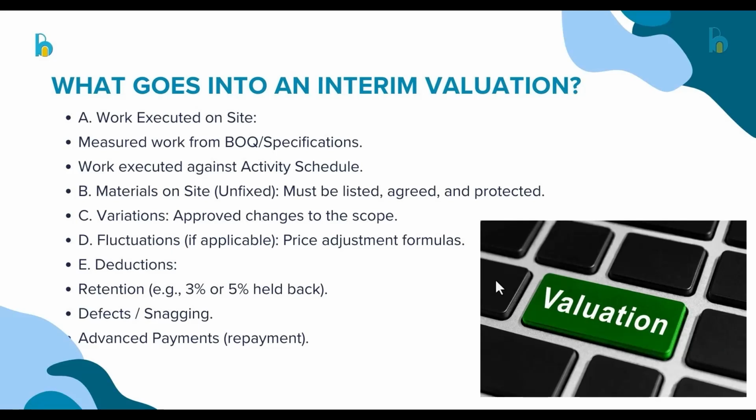Then secondly, measured work from BOQ/specification. That also goes into valuation. Work executed against activity schedule. So when you have work that has been executed against activity schedule, it can also go into your valuation. We have the materials on site. It must be listed, agreed, and protected.